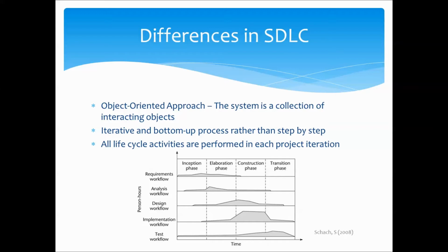Groups of components are divided into project activities based on the use cases of the project, and this allocated group will perform all steps of the life cycle, from management and planning right through to implementation and operation. The results of the iteration are then used as an input to the next iteration, and the cycle continues until all elements of the project are completed.